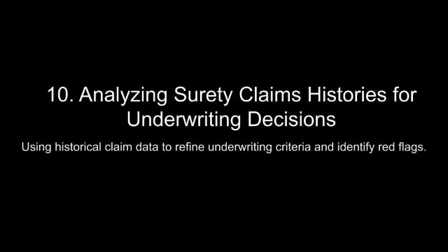The theoretical framework of supply chain risk management highlights the vulnerabilities introduced by multiple tiers of contractors. The principal's failure to monitor the subcontractor's performance and financial health contributed to the default. Practical methods to mitigate such risks include implementing rigorous subcontractor pre-qualification processes, ongoing performance monitoring, and contractual provisions that allow for intervention in case of underperformance.